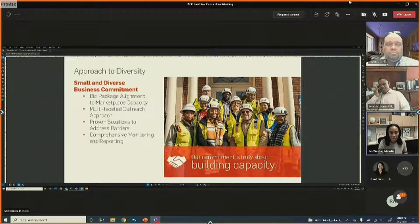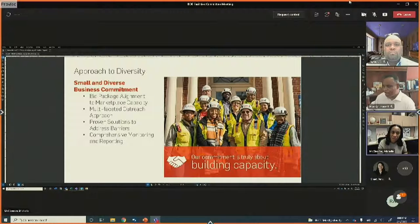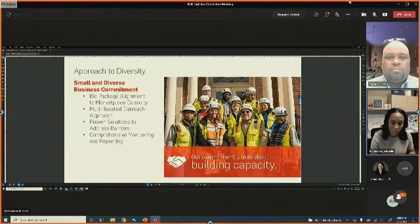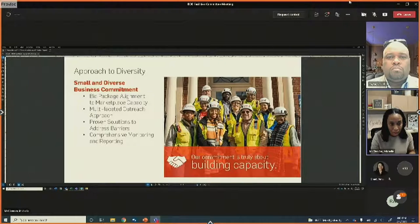The February 21st outreach session at Proviso East invited subcontractors to walk the project and learn about it, and was also used as an opportunity to pair smaller contractors with larger ones. The procurement department has been actively responding to inquiries and pairing subcontractors together to create opportunities for diverse and small businesses.